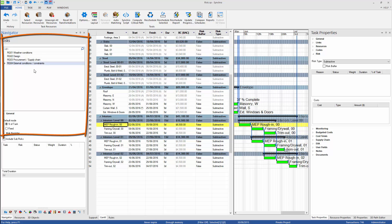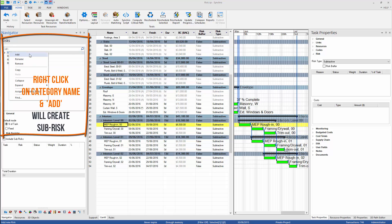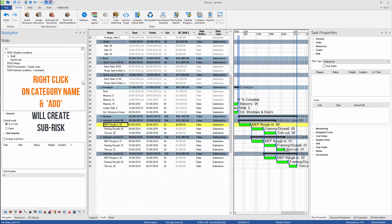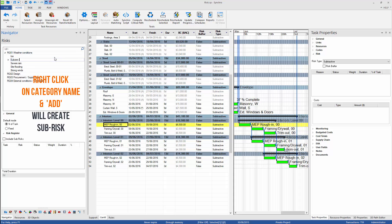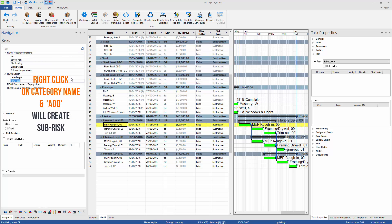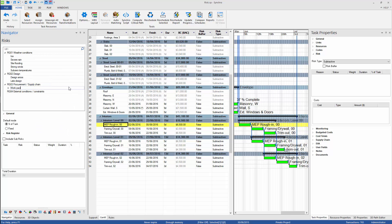Once risk categories are created, we can add specific risks. To do so, we need to right-click on the category name and choose the Add command to create specific risks. Newly created risk will be automatically added to the selected category.